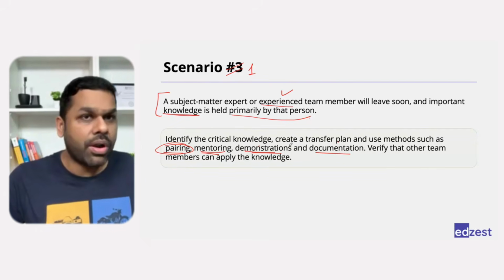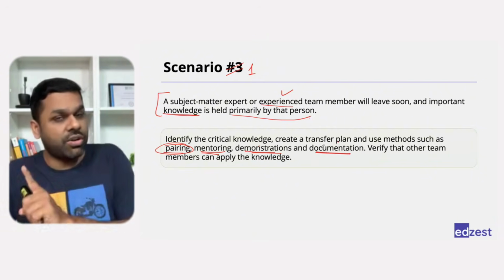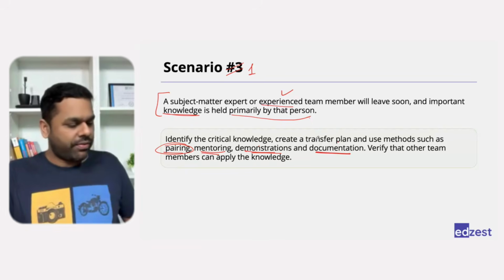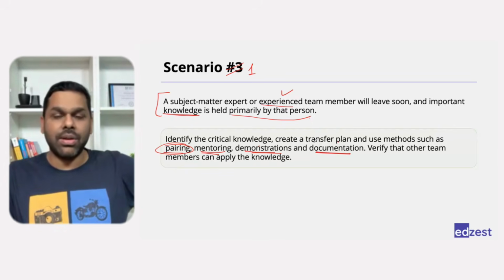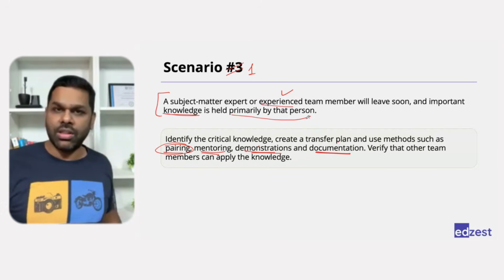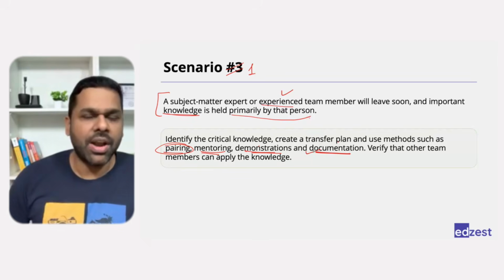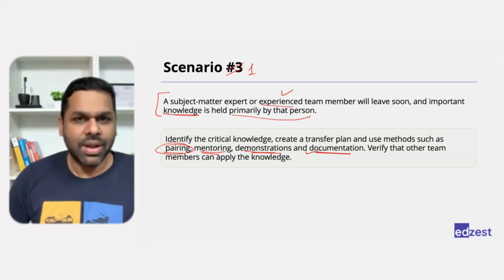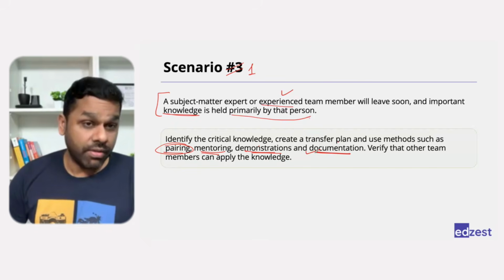Demonstration of their work, the product that they have developed, and the documentation, not just documentation, right? Do not fall into an impression that if that person is leaving, we will be able to capture all the information, all the knowledge that they have through documentation, and our team will learn. It will not happen. Okay, that is why we have notice periods before people leave.